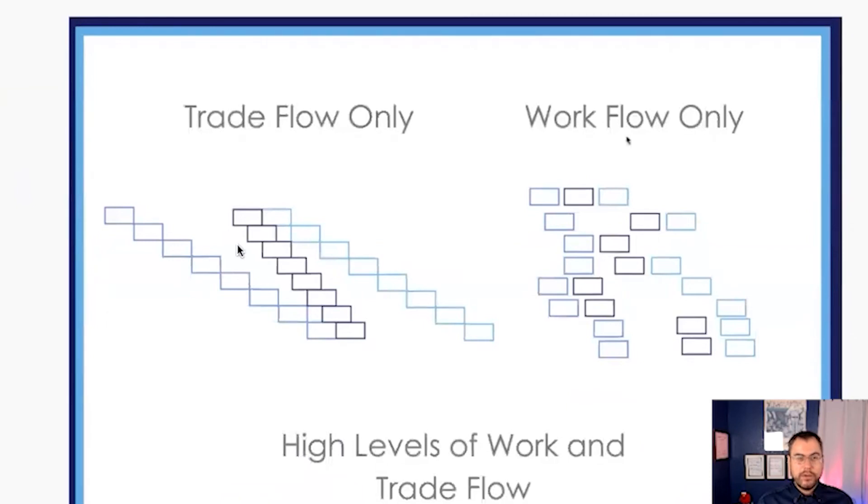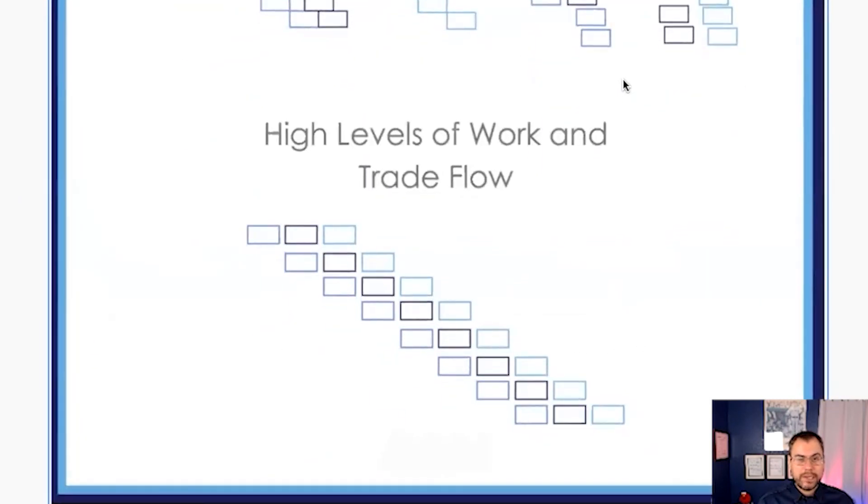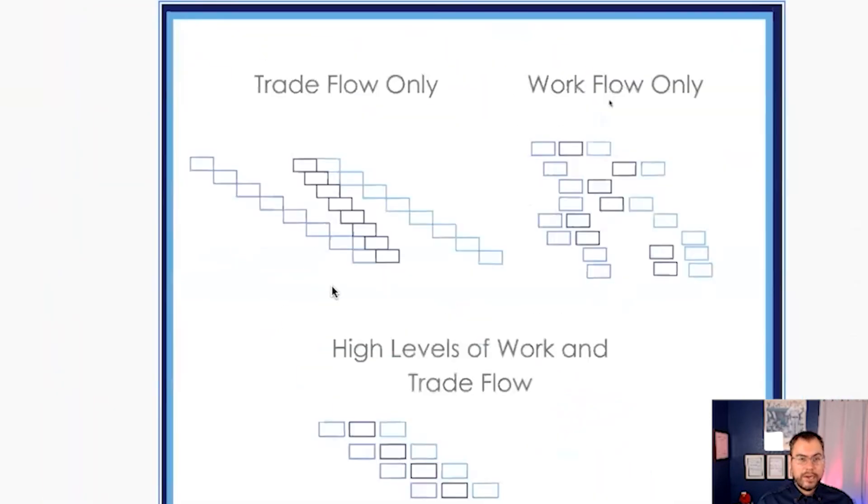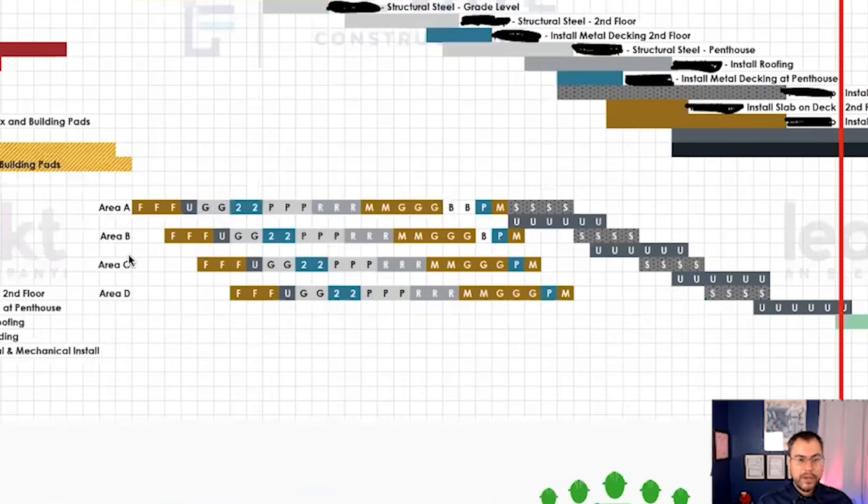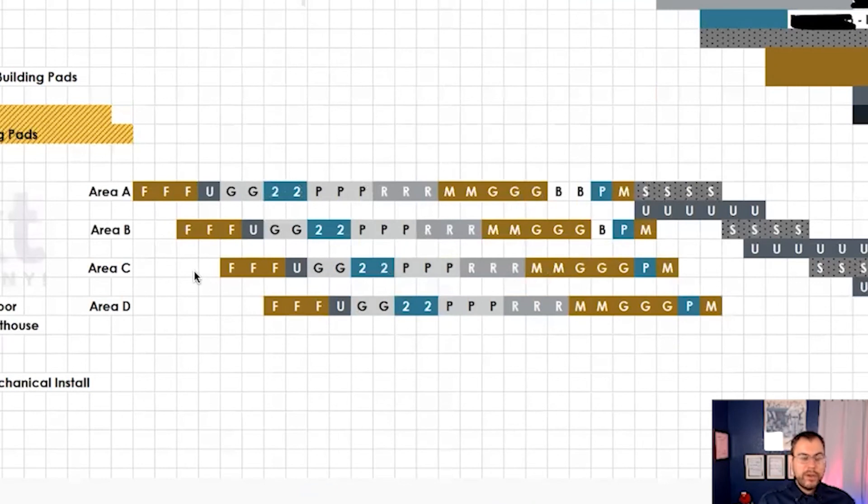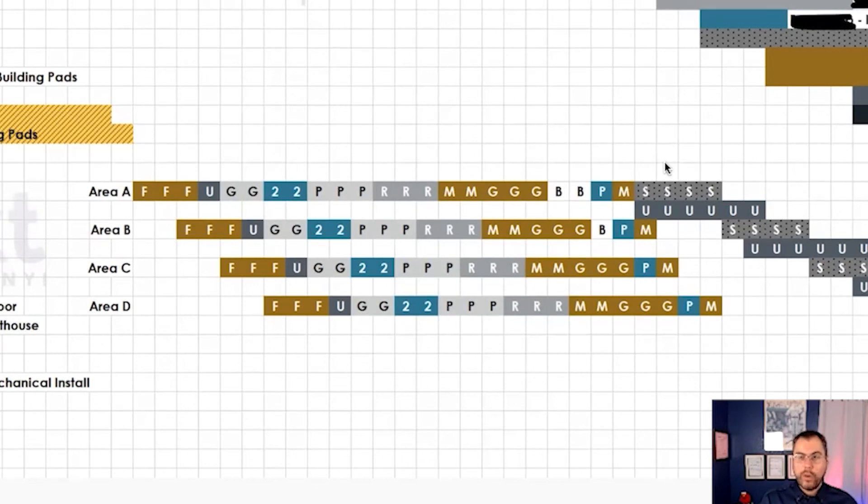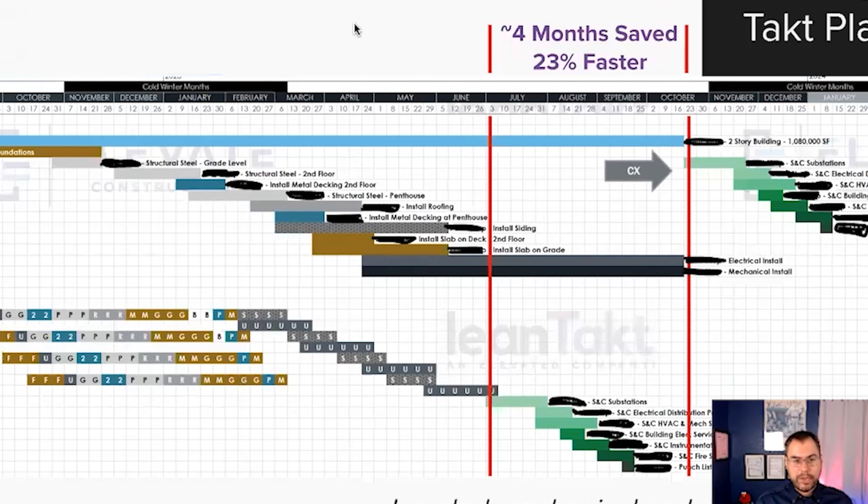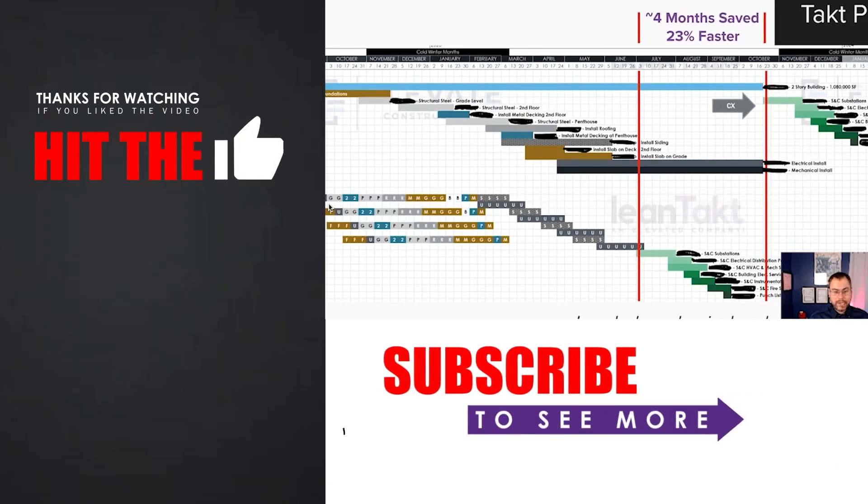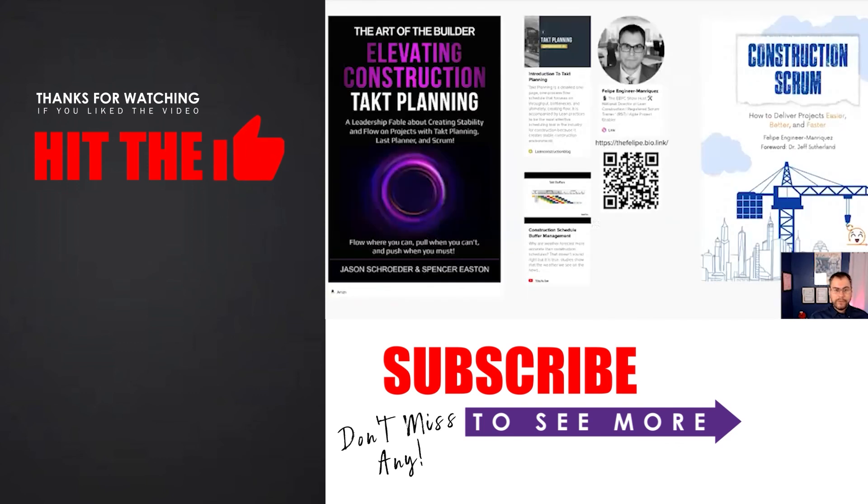So you see, if we focused on trade flow only, we'll have these huge gaps. If we work on workflow only, like we do in a critical path method schedule, but if you combine both together, you can have trade flow and workflow. And now we also have logistical flow through the site. We know staging of materials. We know high levels of certainty when we're going to actually need things. Manufacturing construction project, one day to decompose the critical path method schedule into this lean tack template. And then 15 minutes, we made a first pass tack plan with the electrical and mechanical trade partners and the project superintendent for months of schedule time.